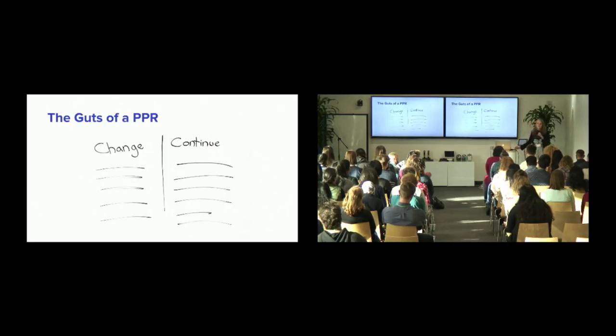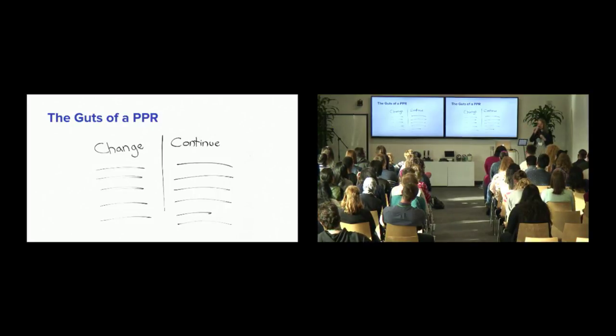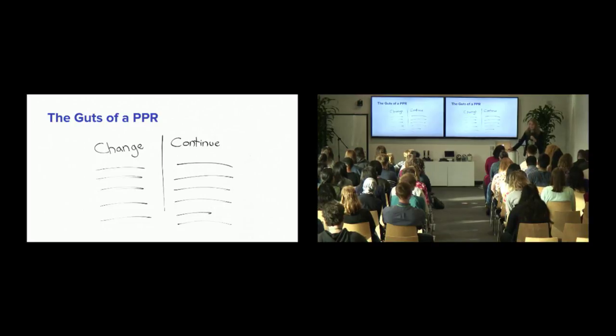And then changes, same thing. What didn't go so well? What would we change if we could do it all over again? And then there's also the idea of a parking lot, which in Portland most often gets called a bike rack, as you can imagine. And so you just write these up on the board. And it's fascinating to hear as people build off each other, and if there ever become quiet moments in this facilitated discussion, it's the facilitator's job really to step in, ask more probing questions, or to really pull quotes from the survey and to really force people to talk about things.